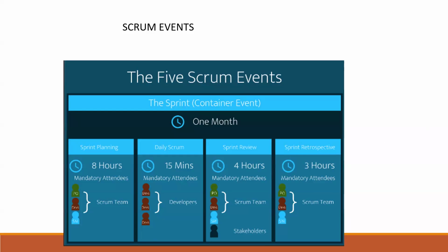If it is going beyond 15 minutes, as a scrum master, if you are there in that call, you should stop them. Or you should make them know that this is only for 15 minutes. If it is extending more than 15 minutes, please talk personally or have another meeting. But don't include that in the scrum. So daily scrum is only for 15 minutes. Every day this should happen.